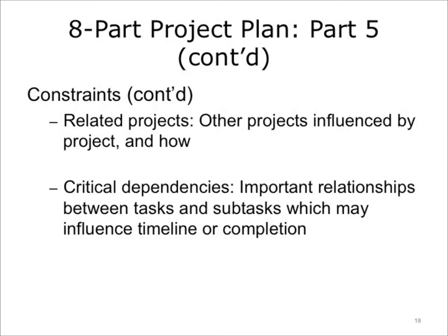Critical dependencies. Likewise, it is also essential that the critical dependencies between related tasks and subtasks, whether internal or external to the project, be understood to ensure that tasks are sequenced correctly so you can maximize efficiency, and so that the project can run smoothly, minimizing unwanted downtime. Determine the relationship between work performed in a given task or subtask with the work performed in other tasks or subtasks. Identify the predecessor and successor activities. Identify any tasks within a related project on which this project is dependent, and describe each relationship.